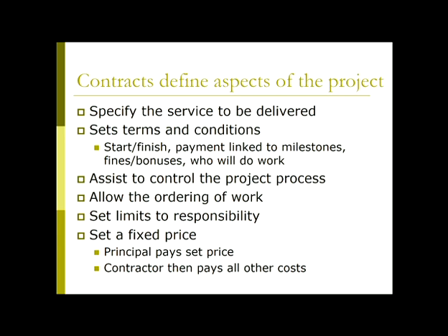There'll be all sorts of things within the contract of building the house where responsibility is defined. I will do this, but I won't do that. And of course, the price will be fixed, and the price for the different stages. And the contract also enables you to stage the payment, and the importance of that we'll talk about in just a moment.